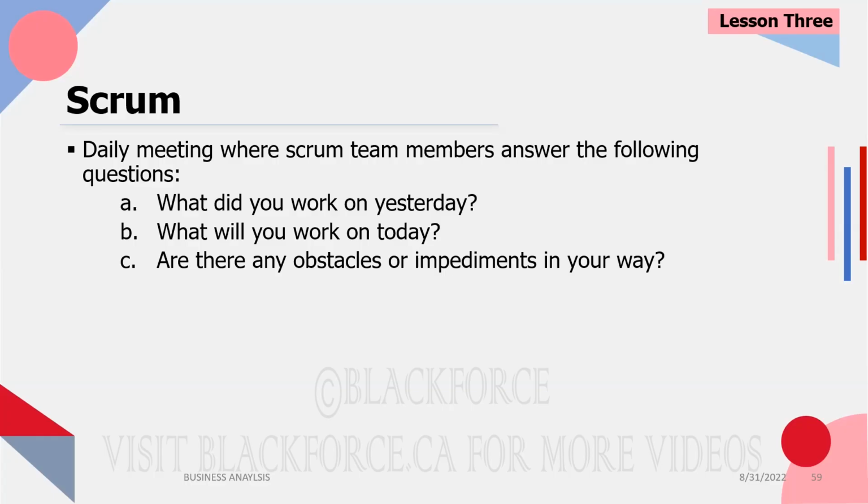So what would happen typically is that a Scrum holds every day. Scrum team members come together, usually stand in a circle. Usually you should be standing in a Scrum. The Scrum is supposed to be a very short meeting. That's one of the reasons they don't sit, because when people sit down, they're comfortable and they don't know when to stop talking. Depending on the size of the team, a Scrum may last anywhere from 10 to 15 minutes. It's not a long meeting at all, but it happens every day.